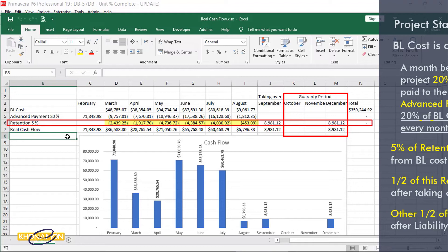In this example, we suppose that the liability period is just 3 months. So the other half of the retention is paid in December, at finish.